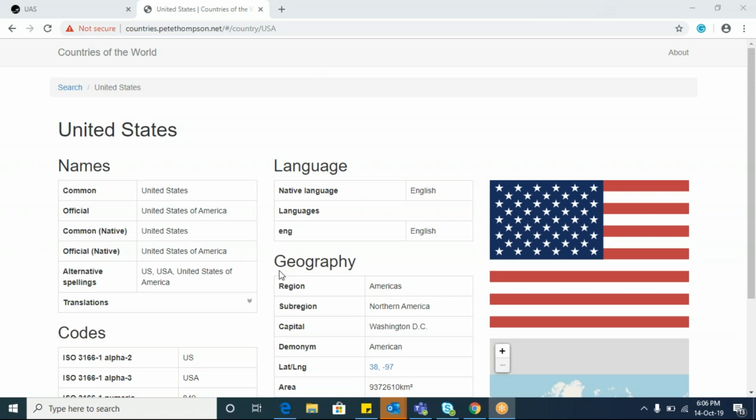Okay, no problem. We will discuss it on Thursday. Yeah, sure. Most of your feedback will be addressed within the sprint. Feedback that needs more effort, we usually take to the next sprint. For user improvements, I have created a separate deck. We will take up user improvements at the end of our sprint, the feature release.